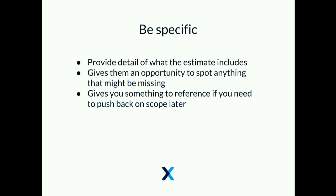The next principle I try to follow is to be really specific — tell them exactly what the estimate includes. That's a way of flushing out what isn't included that they might have thought was included. I picked this up from my partner who has a painting business. Whenever he does an estimate, he lists the specific tasks: prep, two coats, and cleaning. That gives the customer the opportunity to say, 'This wall is going dark to light, so it's going to need three coats.' You have that conversation at the beginning rather than the end. And it does give you something to reference later if the scope starts to spiral.